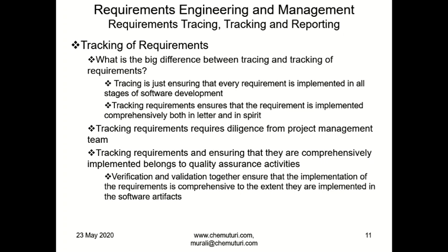Tracking requirements. What is the big difference between tracing and tracking of requirements? Tracing is just ensuring that every requirement is implemented in all stages of software development. You ensure that it is implemented. And tracking requirements ensures that the requirement is implemented comprehensively, both in letter and spirit. Tracking ensures that the requirement is implemented as defined, as requested by the stakeholder. Quality is here and quantity is in tracing. In tracing, we just ensure it is there. How well it is there, we check in tracking.